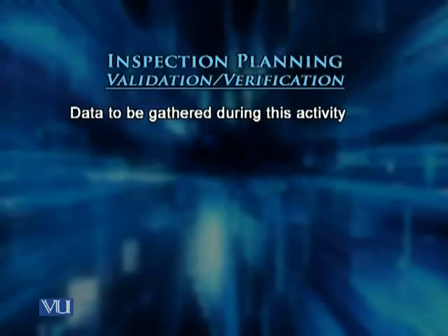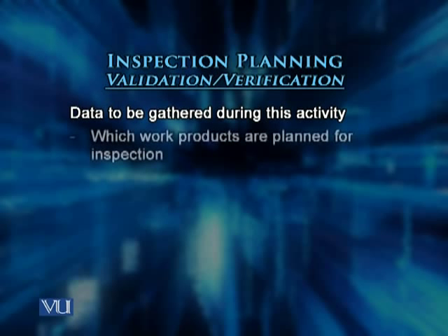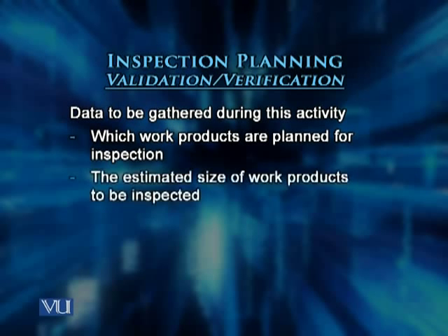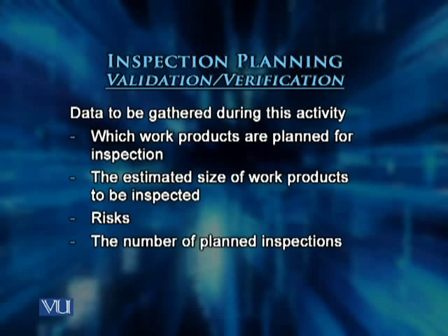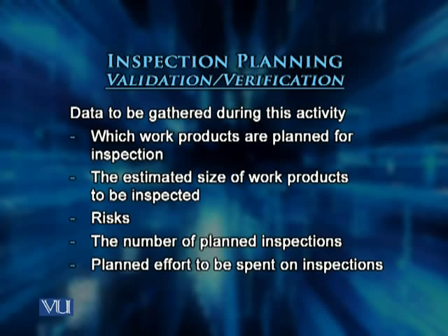The verification part also includes the data that will be gathered during this activity. As far as the inspection planning activity is concerned, what kind of data can be gathered? We can gather information about the work products that are planned for inspections, the estimated size of work products to be inspected, the risks in the inspection process, the number of planned inspections, and planned effort to be spent on inspections. These kinds of things will help us later in the project and in future projects to improve our planning and the process of conducting inspections.